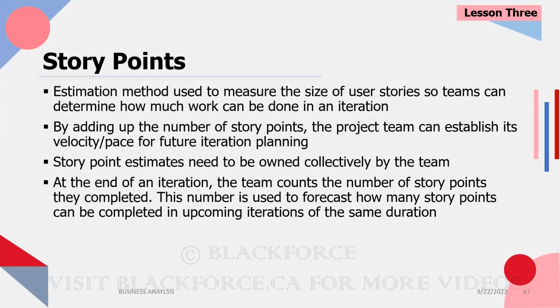Okay? But if we don't measure the stories, like if we don't have a sizing for the stories, we're just going to be going by the number. The point here is you cannot go by just the number of the stories, right? 5 user stories today will not always mean 5 user stories in the future. It boils down to the size of the story. And that is why we need to measure the size of the story. And the size is usually related to the level of complexity. We'll look at a few examples of story point estimation in a bit, okay?